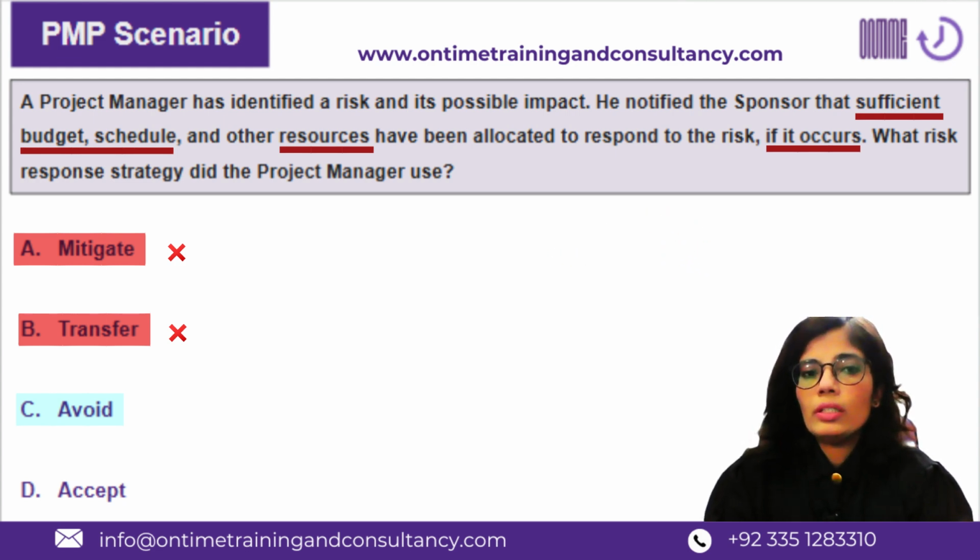In other words, in risk management language, the avoid strategy would make the probability of occurrence for that risk equal to 0. So that risk after applying the avoid strategy is definitely not going to happen, and when it is not going to happen, then definitely it's not going to negatively impact you.